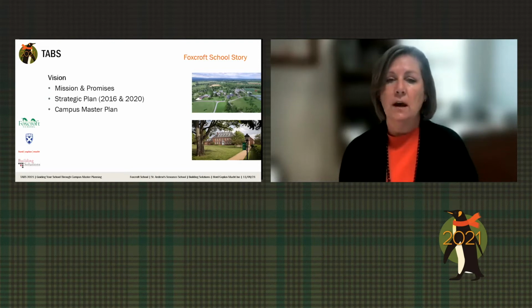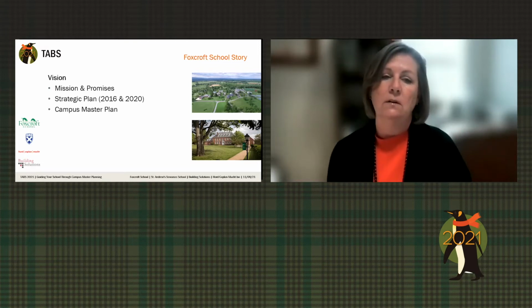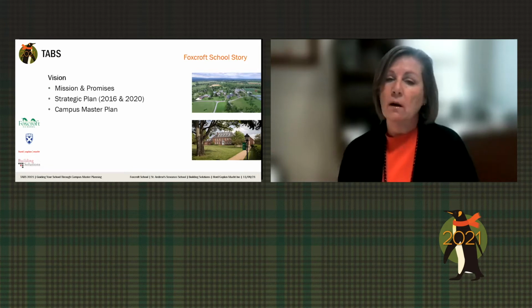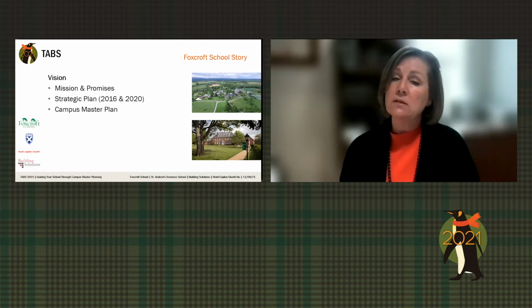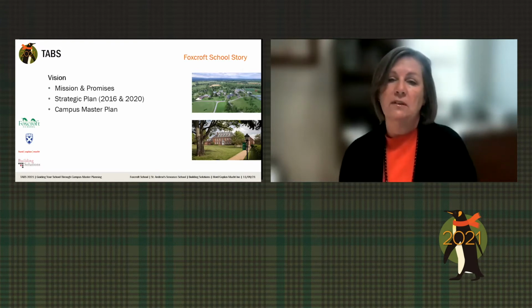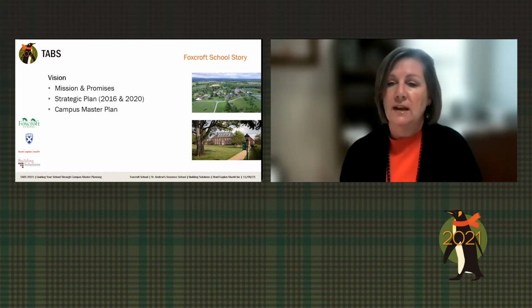We engaged, with Peter's help, a firm that did MEP evaluation, mechanical, electrical, and plumbing evaluation of all of our buildings. We were able to assign age to those items. We also happened to run our own wastewater treatment plant and our water. So it really was a big undertaking, and it took a lot of people to gather all of that information. We also engaged in a landscape analysis. You can imagine over the years, people's tendencies were to put in things that were specific to them and not looking at the overall plan for the campus. So we did a lot of data gathering before we could even engage in a thoughtful campus master plan.